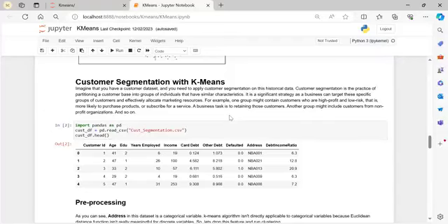Let's suppose the customer comes and says, can you build this whole solution? I just want to outsource this particular project to you. Then this is more of a fixed bid. Then we will scope that entire project and come up with a proper amount. We say that, okay, to build this particular solution, it may take $10,000, and it may take around 6 to 7 weeks. So all that estimation, scoping, assumptions, everything we will put in one proposal and share with the customer.